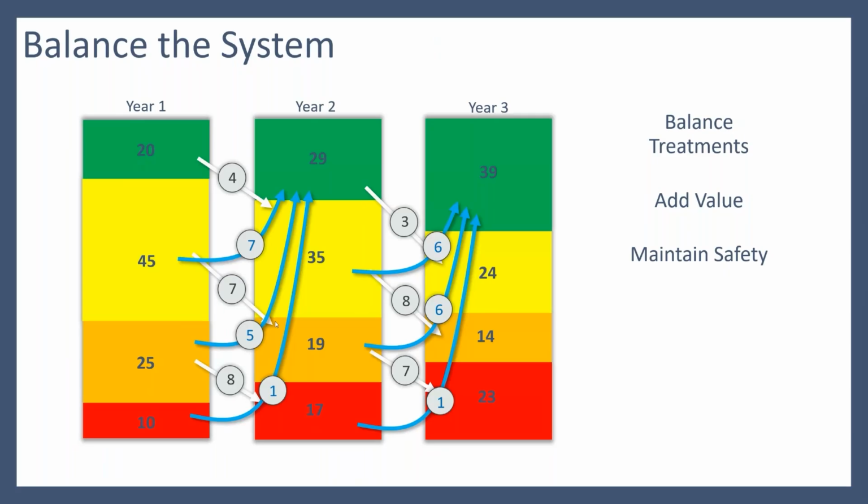The other thing that you can do, if you can demonstrate that you have this program in place and that you have this full strategy, you're collecting the data, making these decisions, sometimes you can get extra funding for some of the specific projects on the red roads. The key is to prevent as many of the orange and yellows from dropping into the red condition. So if you can treat those and then very slowly build up or get some separate pot of money, some separate funding or maybe grants, something like that, to treat some of those red category roadways, that can help catch up too.